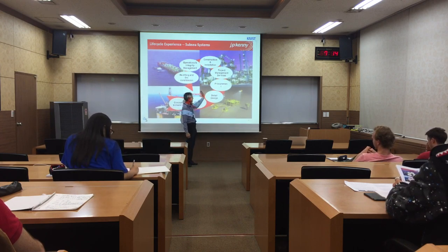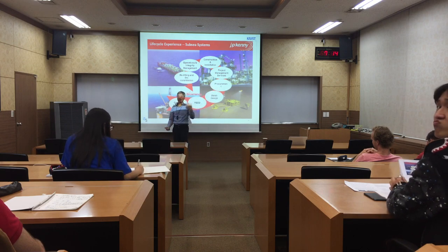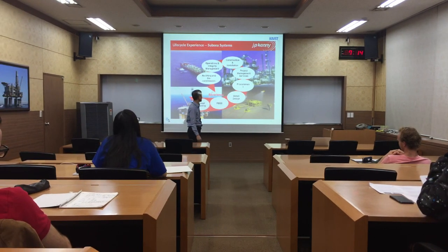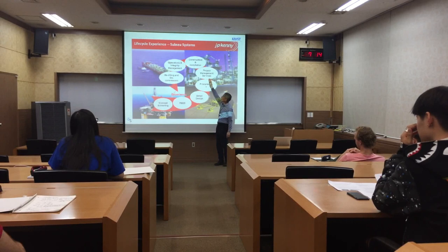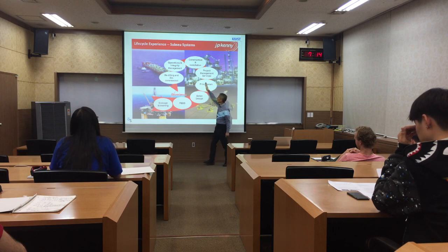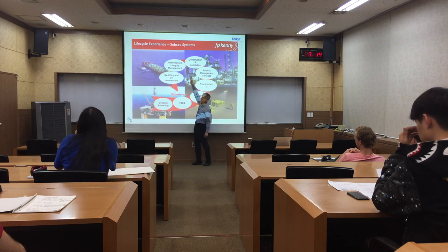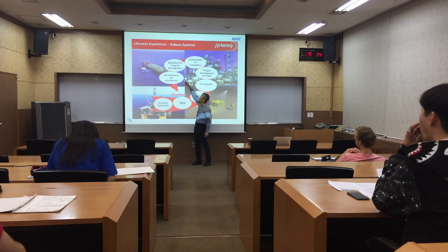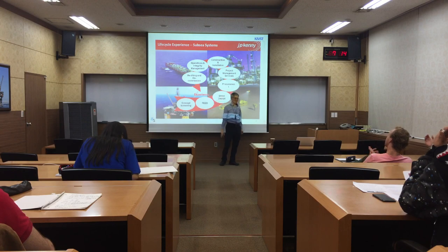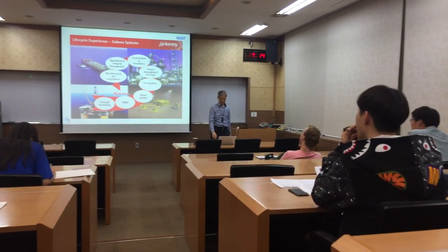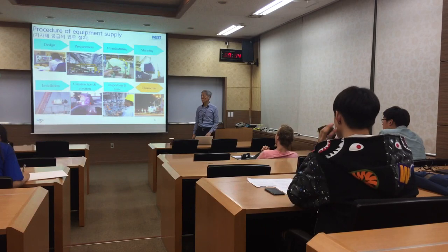After the contract, then the shipbuilders. Samsung is in charge of detailed design and procurement of plate and equipment and other things, right? And project management services, and final construction and installation of equipment from procurement. Then delivery comes here. After construction, delivery, and after delivery, there is operation, maintenance and management. And finally, decommissioning comes. That is the usual schedule or procedure.